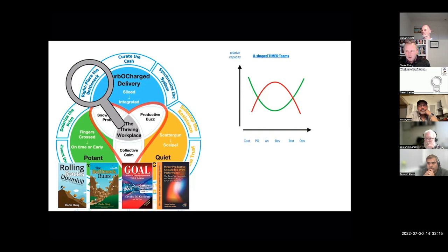And then we dug in a little bit more, and we went, oh, that's interesting, because the leader of the team said something as a passing comment: quite often we don't get enough stuff from our product team, we don't get enough fuel passed to us, but we've got tons of technical debt, all sorts of stuff that we can work on to keep us busy. So the developers were busy doing technical debt fix-up, which is really good. And I said to him, do you think it would be better if the product team upstream could feed you stuff and you had less time keeping yourself busy, would that be good for everyone? Oh, that'd be brilliant. We've got so many customers out there craving the development work, but they don't get it because we're held up.